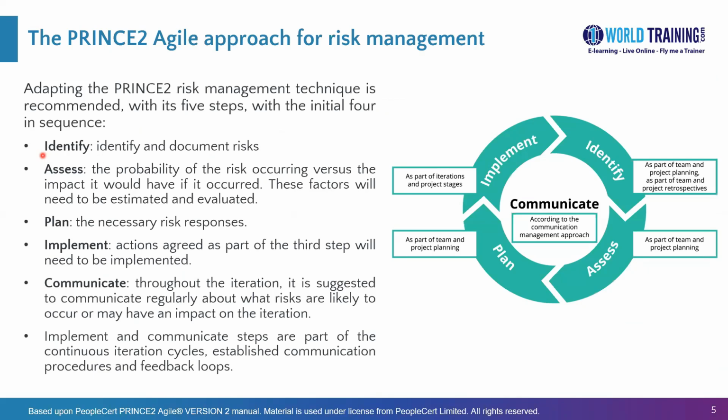So identify is about identifying and documenting risks. This can happen during the team planning, project planning, during the team and project retrospectives. Assessment is to assess the probability and the impact should it occur. And these have to be estimated and evaluated. This is part of the team planning and the project planning generally.